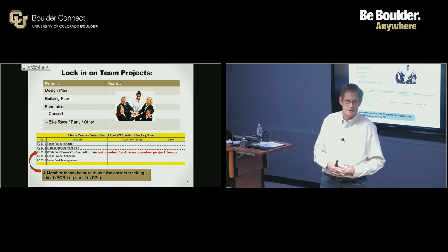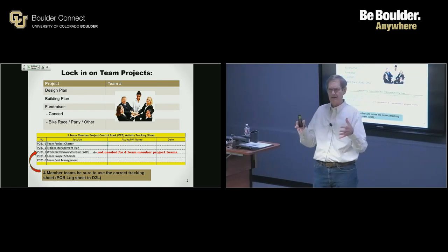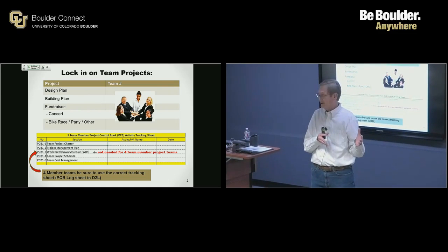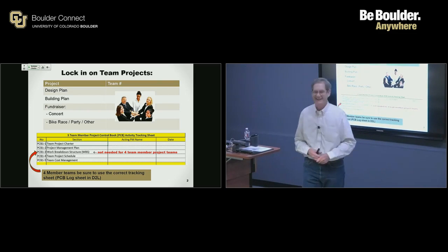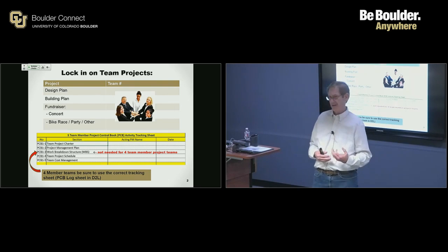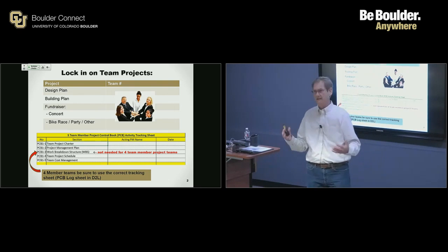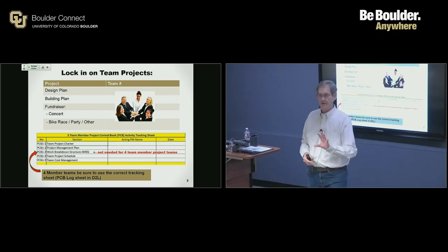So the charter really is an opportunity to kind of lay this out. The proposal, again, was your opportunity to sell the project. This is a great idea. Here's why we want to do this. Sign here. The charter is the next step in the process that says, okay, here's a little more detail about the project. Here's maybe a rough idea what we think it's going to cost. Here's the size and complexity, maybe some of the scope components of the project, et cetera. So it sounds like you got a good approach going there.